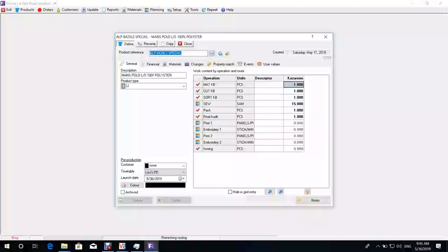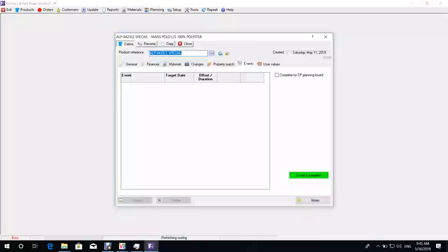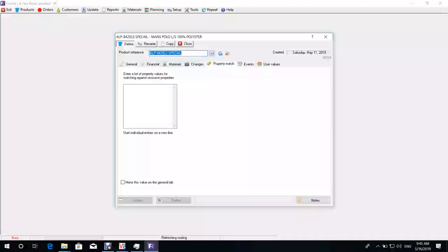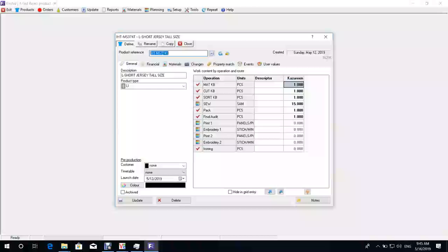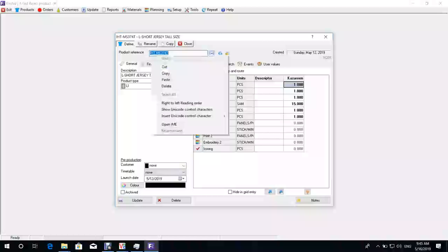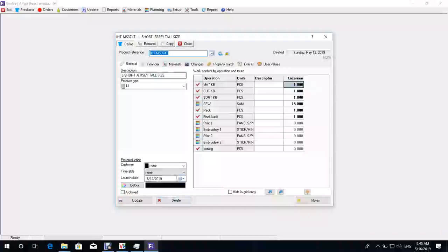The system will do it automatically for you when you select a proper timetable that is already set up with all those days that you are defining today. Because you're telling us, okay, from launch date, I need to do this activity in 2 weeks. I need 7 days, I need 14 days, I need 30 days, I need 45 days for one activity sequenced by another activity. So that's what the system is going to give you, the ability to calculate automatically.